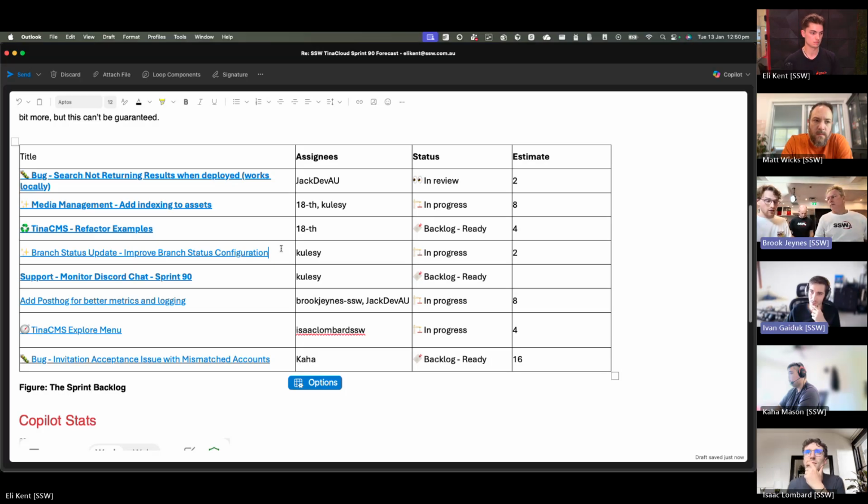Right. My assumption is that in this V4 investigation and work, this will be solved, so I don't think it's worth spending time on. But V4 is a long way away. You'd be duplicating the work. It won't be worth fixing it here if we're just going to end up rewriting the whole pipeline in V4. There's a lot of wasted time. Both of them are very long refactors. V4 obviously has the front end and the APIs. If we concentrated on V4 of the APIs, then it wouldn't be wasted work. This is what the first spike is going to be about, to figure all of that out.